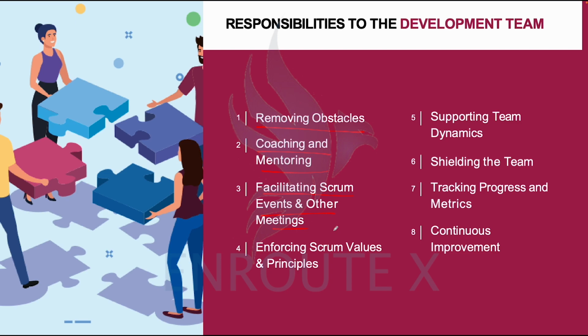The daily stand up belongs to the developers. It is a meeting for themselves to update themselves. It is an inspective, transparent meeting for the developers. It is to improve coordination and collaboration towards the sprint goal. But the Scrum Master is there with them, supporting them when there are issues, jumping in to help them resolve those issues, and also teaching and coaching them on how to run such a meeting effectively.